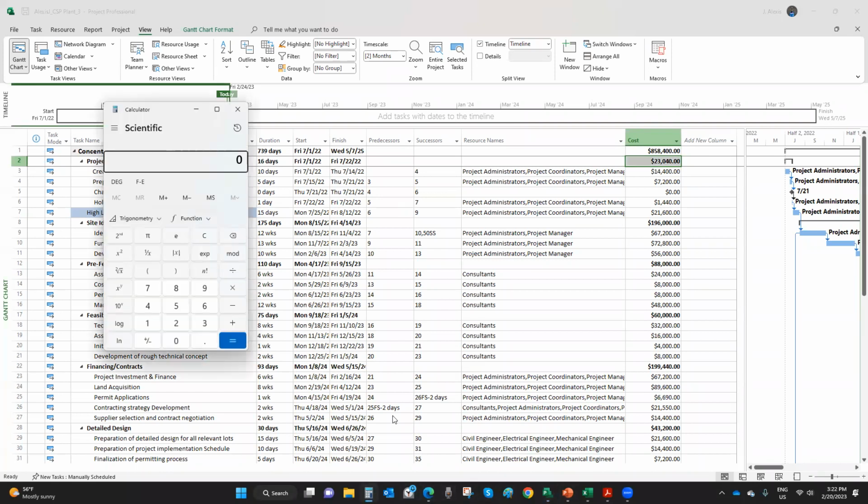So what I'm going to do, I'm going to say that 10% of that is going to be contingency reserve, right? Now, remember, it doesn't have to be 10%. It can be anything according to your organization's reserve policy. Some companies could tell you, well, it's 15%. We approve 15%. Others could tell you it's 5%. So for practice purposes here, we're going to take 10%.